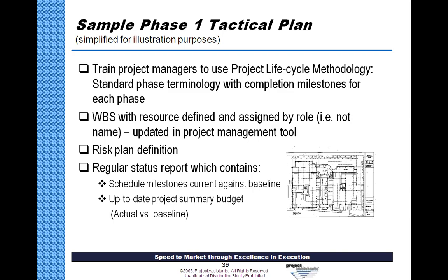Some call it phase terminology. If we had a product lifecycle methodology, for example product development, we might have collect idea as a gate, build business case as a gate or major phase. We would have design prototype, build prototype, test prototype, commercialize prototype, scale up, product lifecycle management, sunset product, and so on.